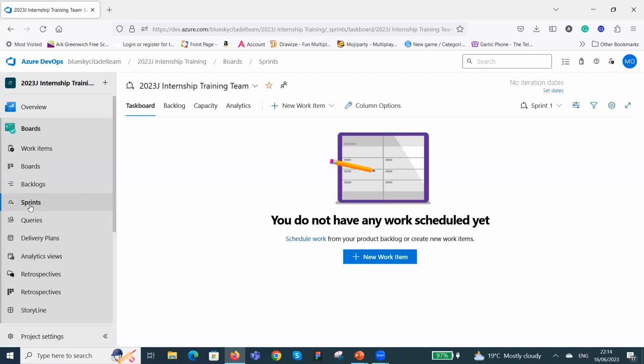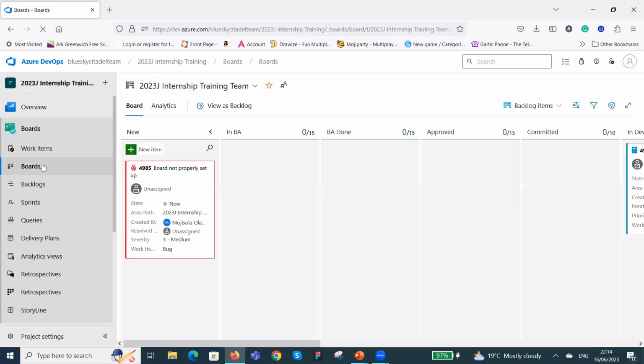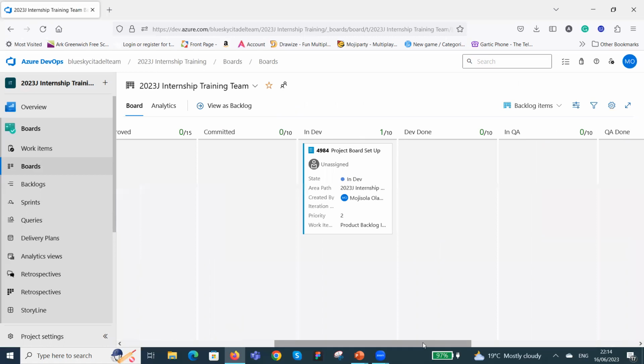But once your sprint has been created and you're looking at the story over here, what you'll be seeing is the state. And then you can use that to run your daily stand-up to say, oh, I noticed the state of the story is in QA, it's been there for maybe a day or two. You'll be able to run your daily stand-up properly. And that's why we need to put the state in, because you won't be running your daily stand-up on this board.